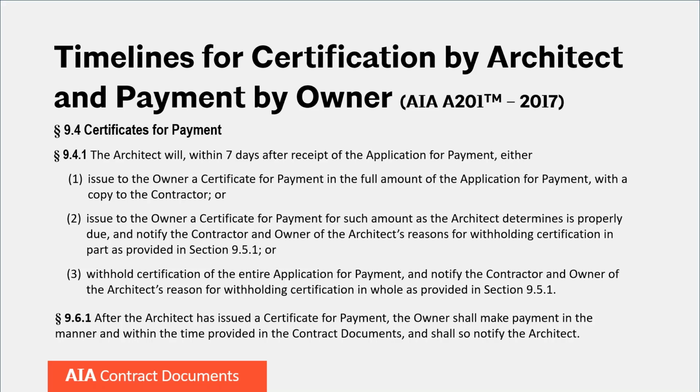payment. And we referred earlier that there could be a preliminary step in this process, that if there's a sense that the architect will not be able to certify in full, to give notice of that and give time to correct issues if possible, because the third item would be withholding in full, meaning that there's some obstacle to releasing payment or items that add up to the full amount that require that payment is withheld.